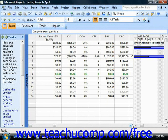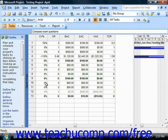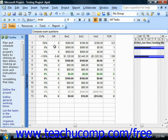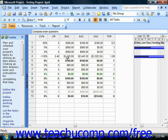The Cost Variance Percentage, or CV%, is the ratio of cost variance to PV expressed as a percentage. The CPI column, or Cost Performance Index, shows how many cents worth of work was accomplished for each dollar's worth of work that was spent. The Budget at Completion is the total baseline cost for the task. The Estimate at Completion represents the forecasted cost to complete the task. The Variance at Completion, or VAC, is the difference between the BAC and the EAC.